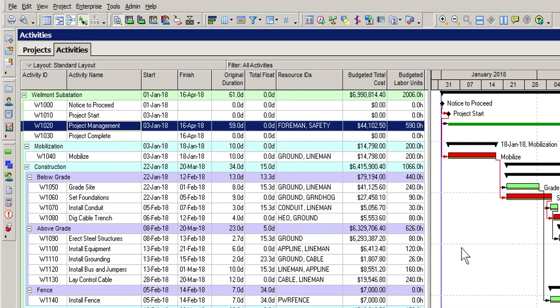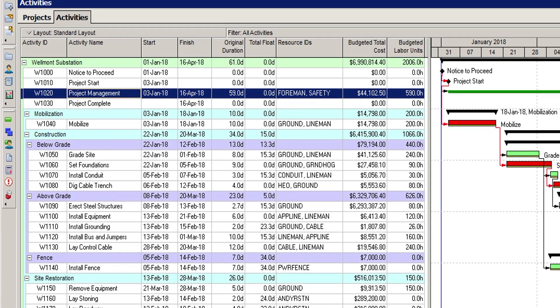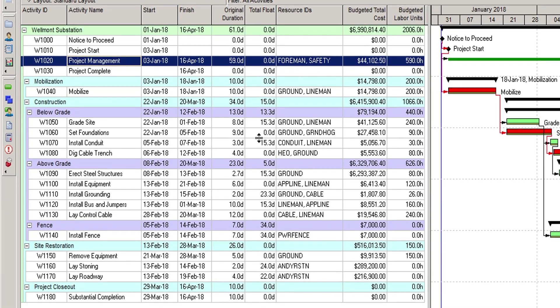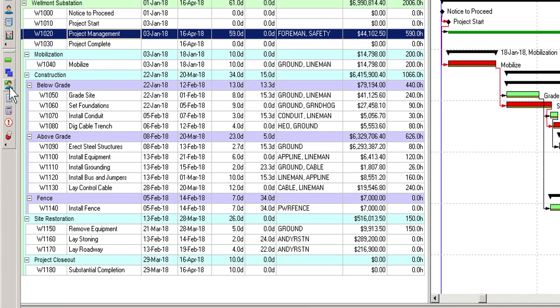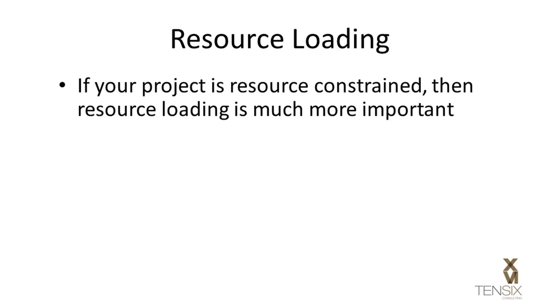Therefore, a resource-loaded schedule provides a more complete picture of the project from both a time and cost perspective. If your project is resource-constrained, then resource-loading the schedule is much more important.